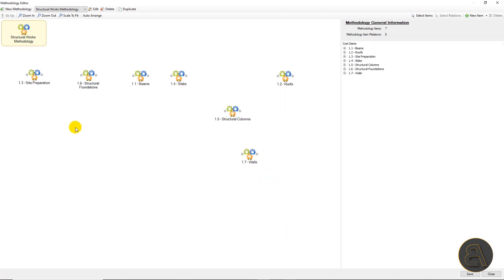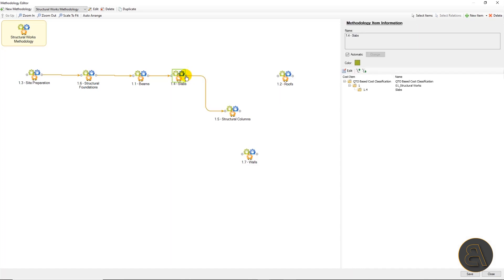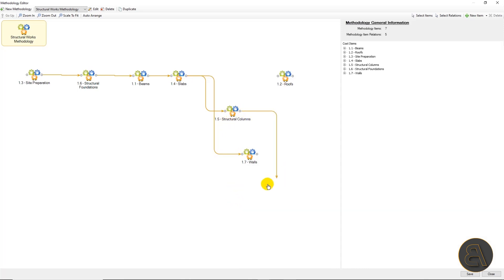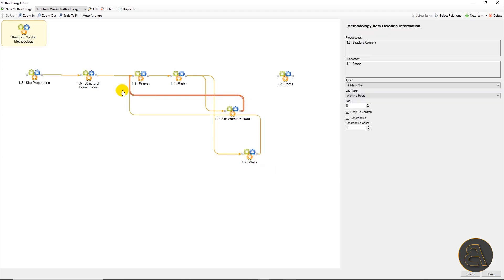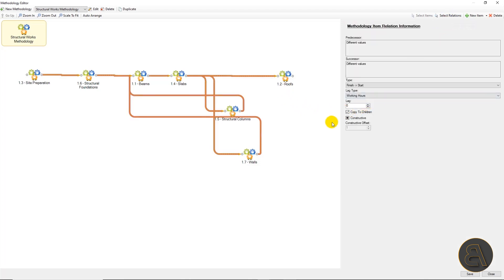Now we'll start connecting these items with backward relations. By default, finish-start relations are created, which is OK for this example. Now we're coming to the important point where we are going to connect the backward relations between columns and walls and beams. Let's select all relations and check the copy to children option because we want all relations to transfer to all children tasks.